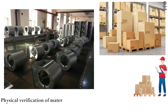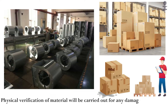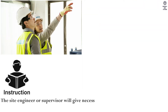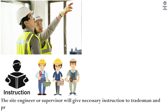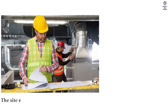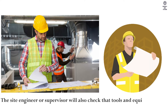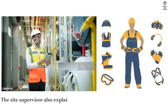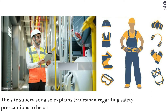Physical verification of material will be carried out for any damages prior to taking from stores. The site engineer or supervisor will give necessary instructions to tradesmen and provide necessary construction or shop drawings. The site engineer or supervisor will also check that tools and equipment available are in compliance with contract requirements. The site supervisor also explains to tradesmen the safety precautions to be observed.